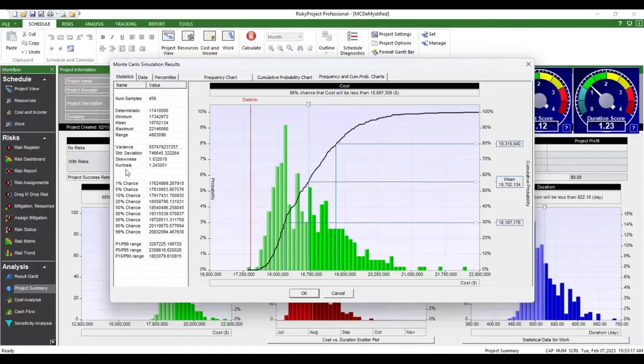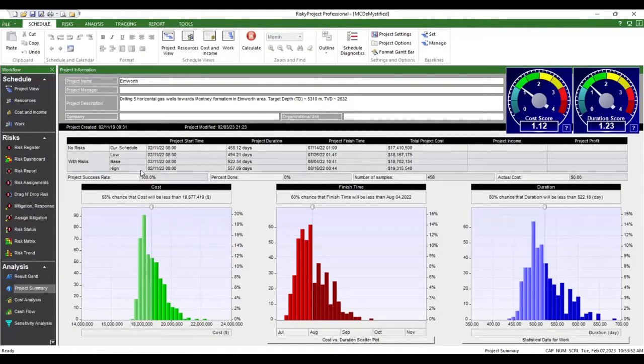So in this case, at a project summary level, our cost contingency would be the difference between, this is just right off the bat, but obviously before any optimization comes, the current schedule and our high. That's sort of what our risk adjusted margin cost contingency would be. The difference on finish times would be the difference between our current schedule and our high.